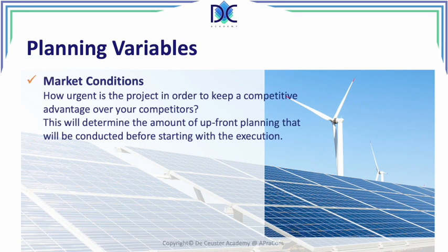We have the market condition. Now, when we look at markets, we have to consider that we may be in a very competitive market. Do we have a competitive advantage over our competitors? What is the importance here? How urgent is the project? We can select an iterative approach when we want to be on the market before our competitors and then improve what we offer.